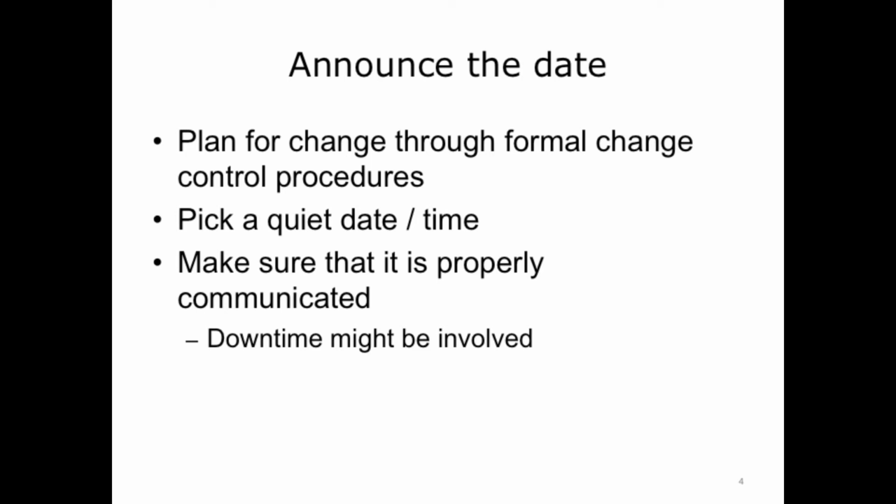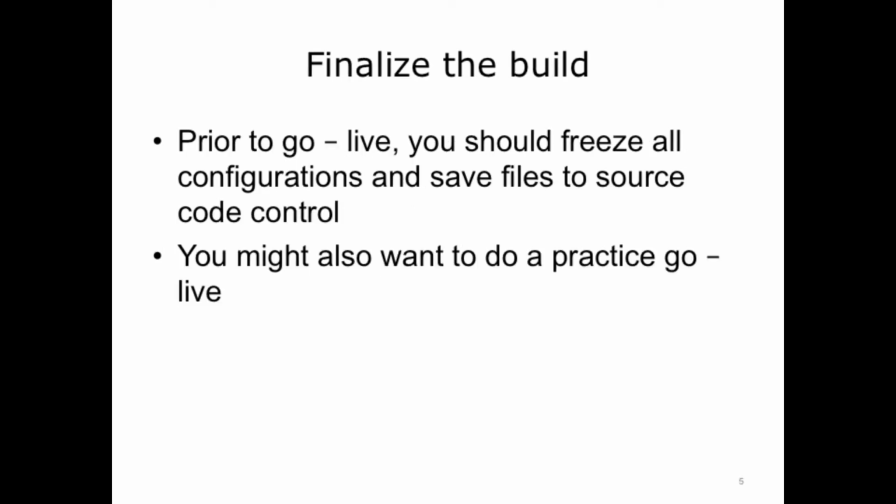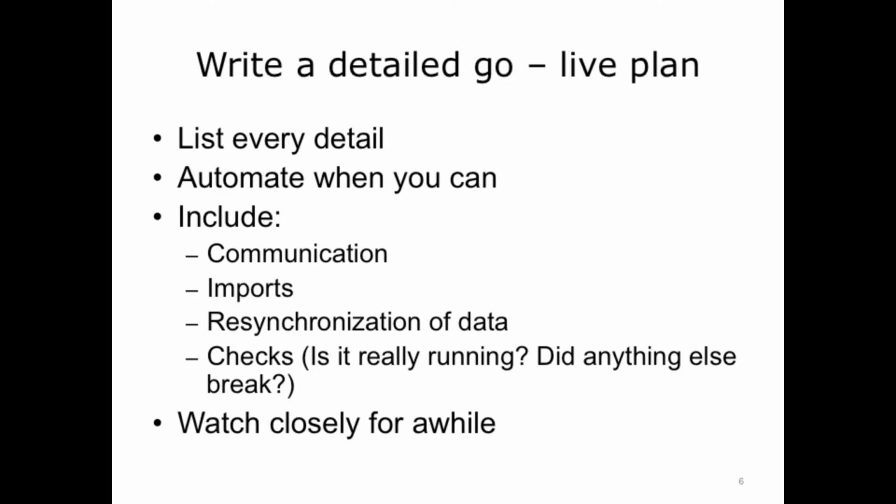Plan carefully. Before going live, make sure you know all the configuration items that are part of the change and save copies of what you plan to change. You might even want to do a practice go live, in which you turn on the feeds from a production system but point them to a test system and then analyze the results. Again, planning is crucial and go live is a team effort.